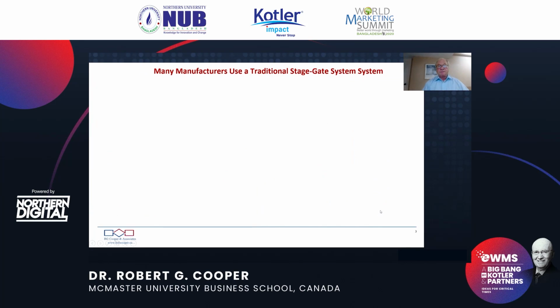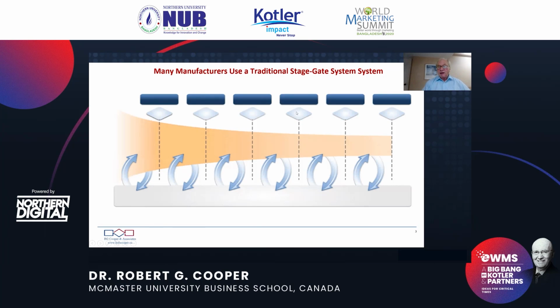So what are people doing? Well, many manufacturers for the last roughly 20 to 30 years have used a gating process, often called a phase gate or stage gate system, to drive new products to market. And this is a typical one right here, one that we actually developed. It's broken into typically 5 stages or phases. The first phase is discovery or ideation, coming up with ideas, scoping, mapping out the initial scope of the project, building the business case, getting definition, justifying the project, moving into development here in stage 3, followed by testing and validation, and finally launch.